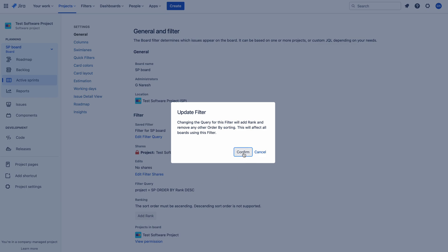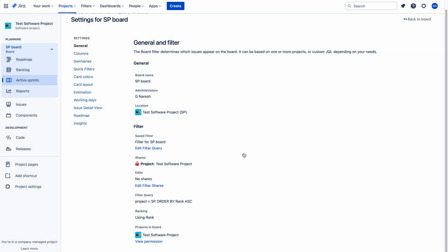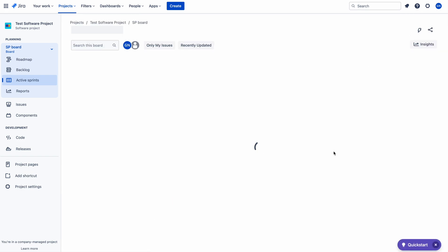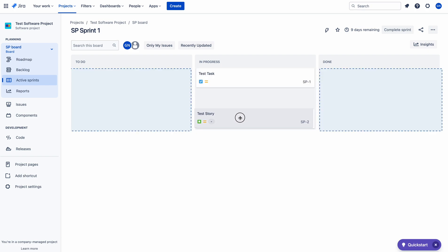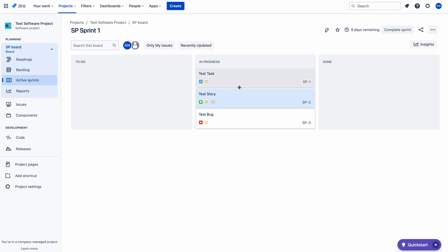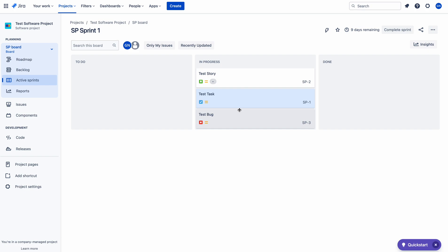So you must have 'ORDER BY ascending rank'. Just click on 'Add Rank' and confirm it — automatically the filter query will change to ascending order. Now let me go back to the board, and if you try to rank the issues, you are able to do it. You can rank the issues when you have ascending order in the filter query. This is the first thumb rule.